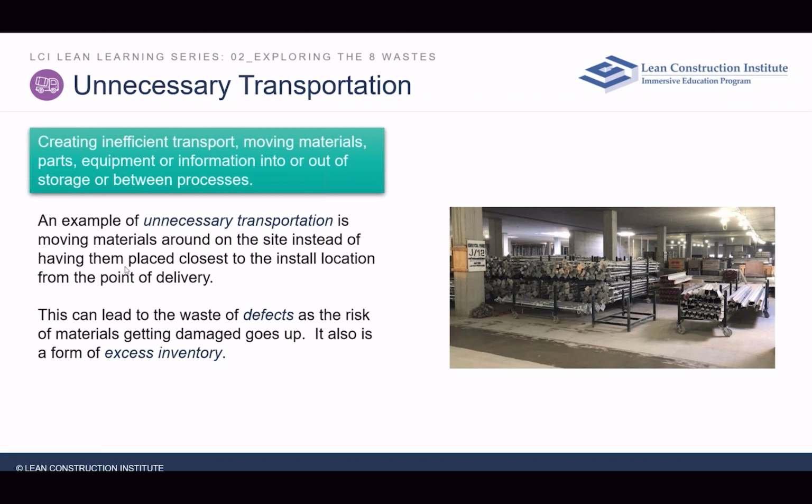In our world, in the union industry that we work in Chicago, workers are now costing the clients over $100 an hour. So it's about $1,000 a day per person on the construction site. To move a pile of drywall that's sitting in the middle of a room so that I can do something else in that room could cost up to $2,000 a day for two people to carry a pile of drywall from one side of the job site to the other, because we didn't think about how we were going to deliver our materials. So we're moving materials around a site.